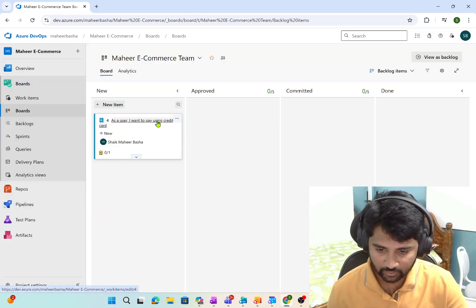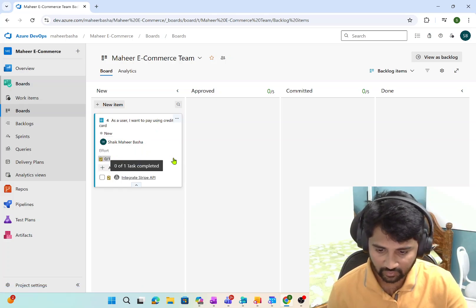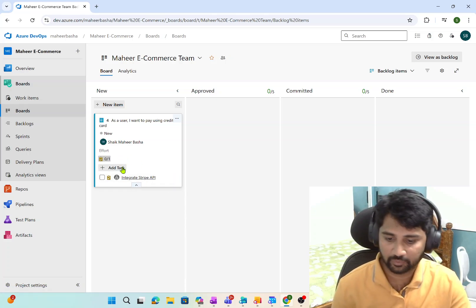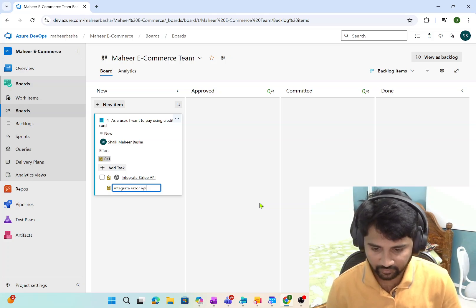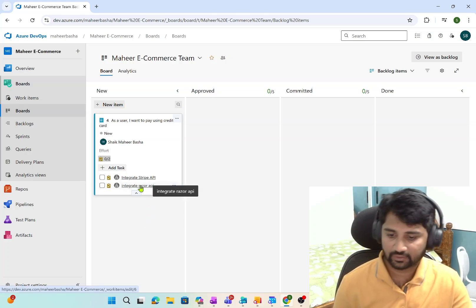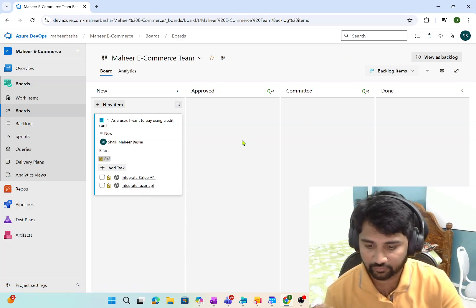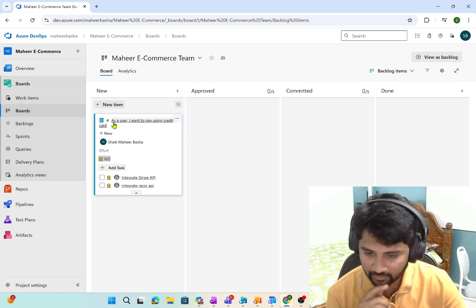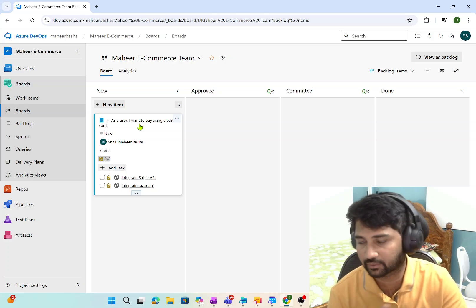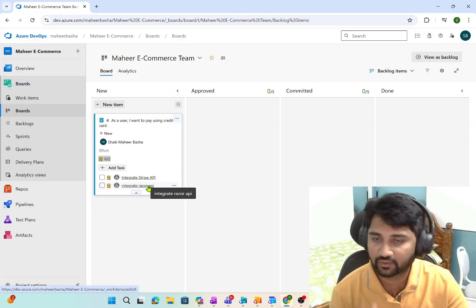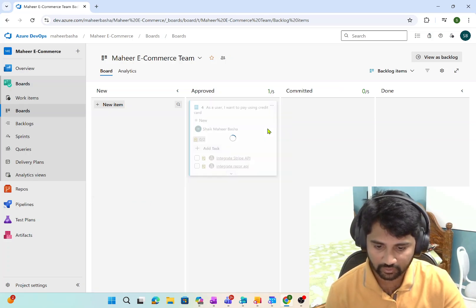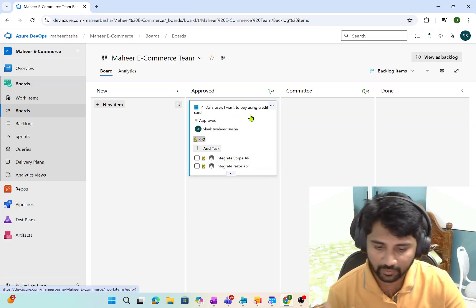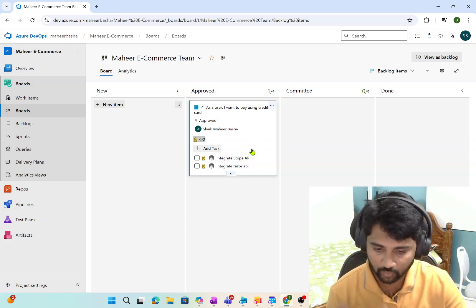Developers basically come to this Product Backlog view, and they will try to complete that requirement. In that requirement, there are four or five small technical pieces which they have to develop. They will add a Task for each one and try to do it. This whole user story or Product Backlog Item — they will start work on it when it gets approved. So a Scrum Master will review those requirements, approve them, and move them forward. Once they approve, developers will start working on it.